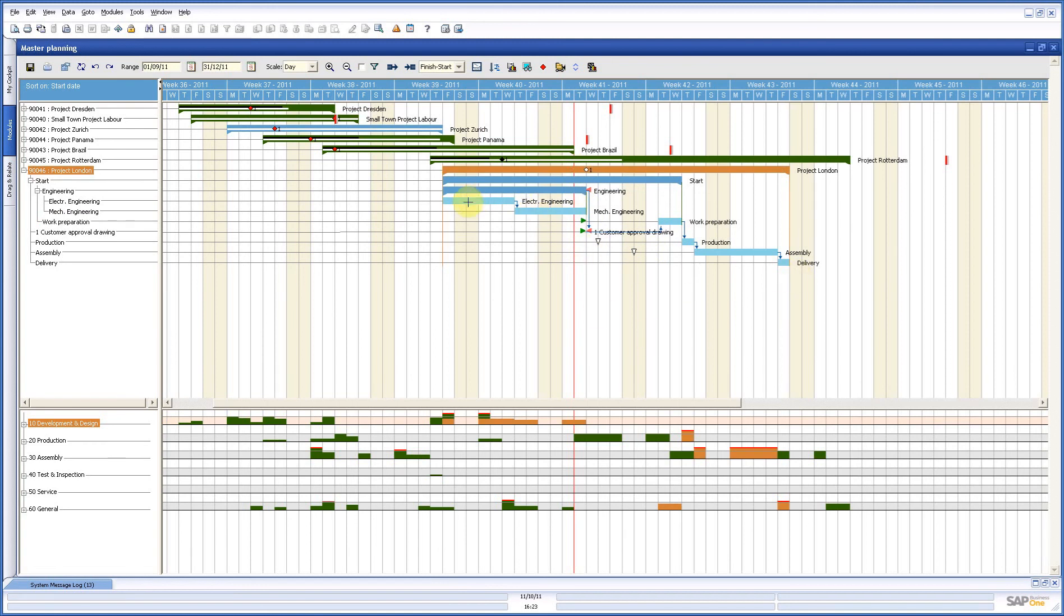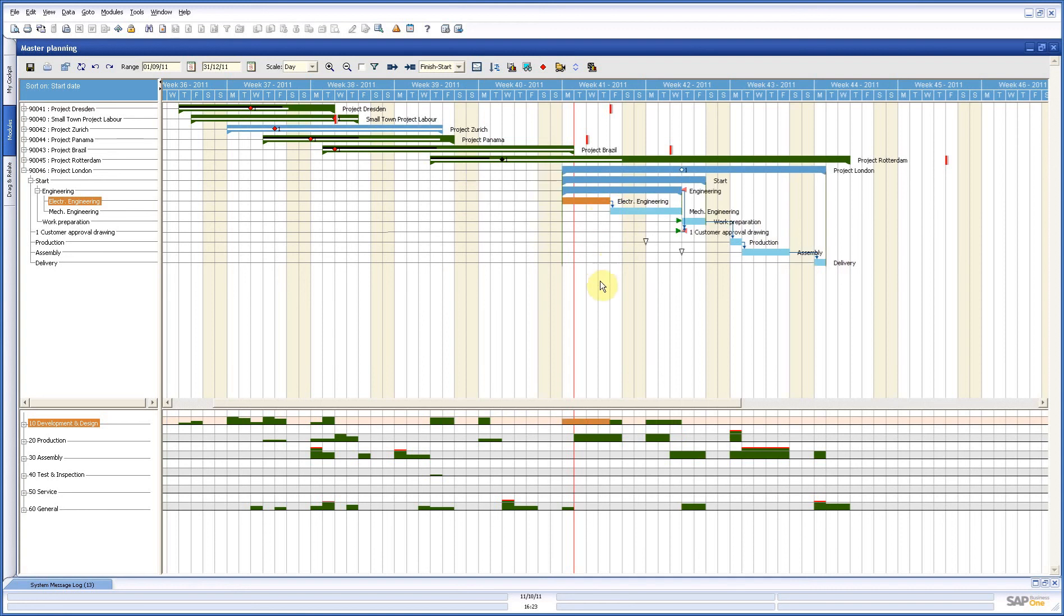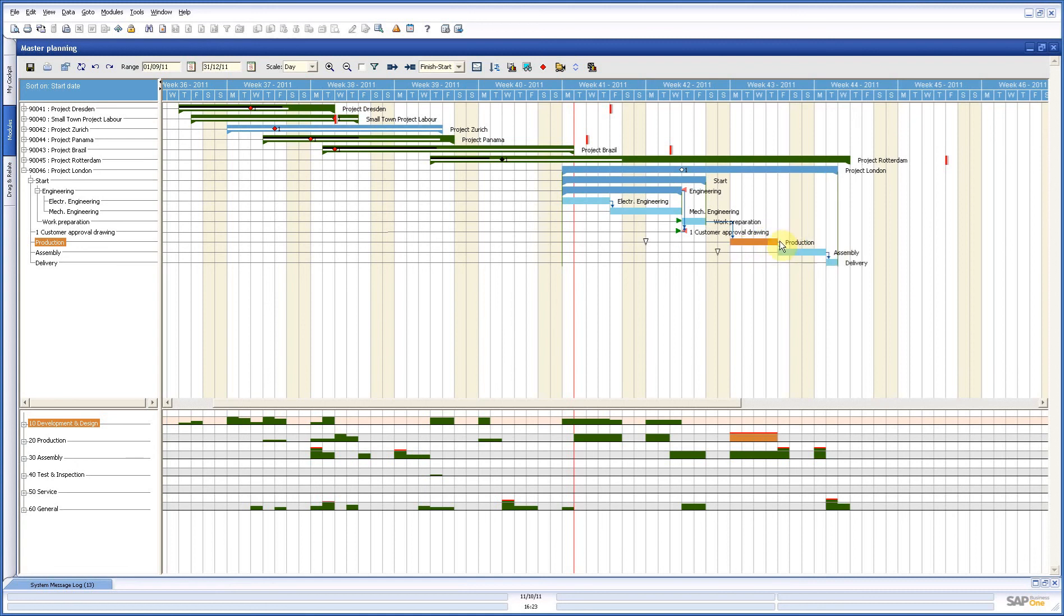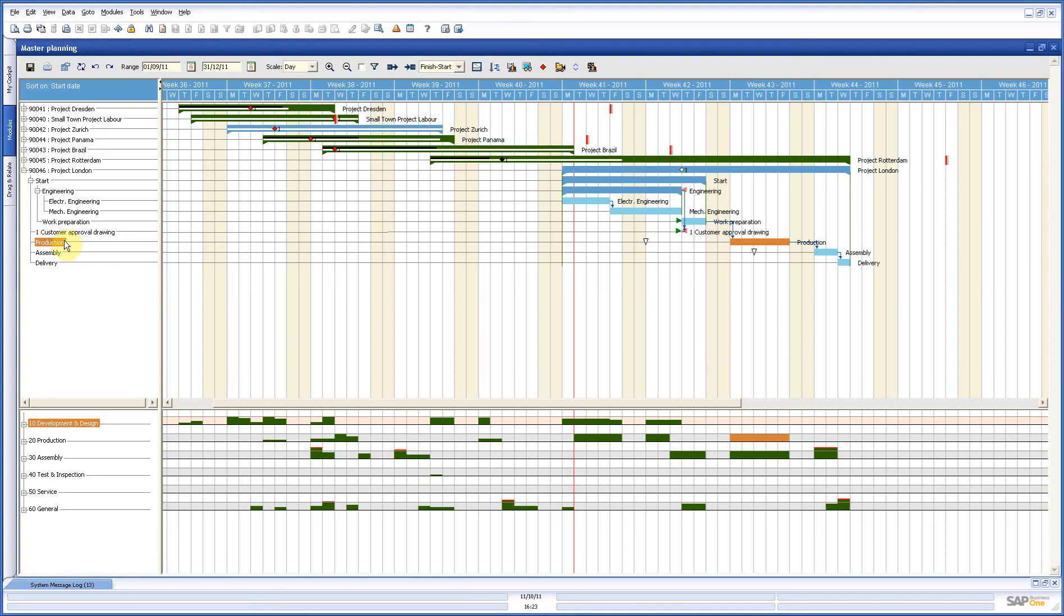What can we do? We can say, okay, we move this example to today, then we have a problem here and we have a problem here. Now, how can we solve that problem? First of all, this problem can be solved by just making the lead time longer. So, in this production, we will say, okay, let's put it on one day more. Now, it fits exactly in one week. Now, how does that come? If we look at production, we see that we have an allocation of 71 hours and that's what we need here in this timeframe.